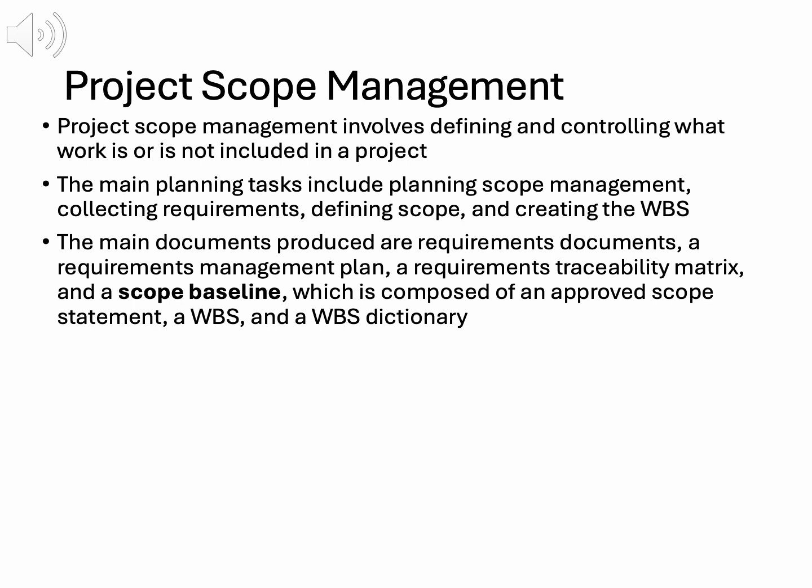These documents are vital. The scope management plan ensures consistent scope control, while requirements documentation captures needs, like specific training courses for the just-in-time training project. The scope statement defines deliverables, such as executive-level courses, and exclusions, like Six Sigma training. The WBS breaks work into manageable pieces, ensuring nothing is missed.